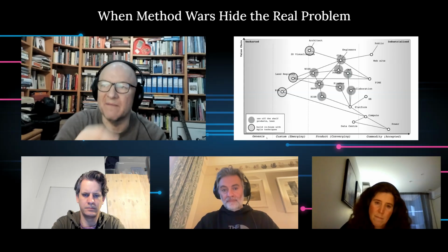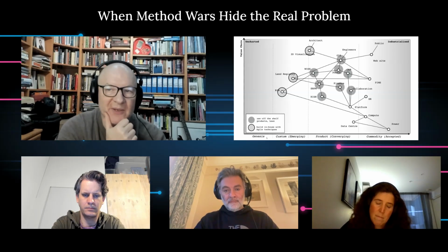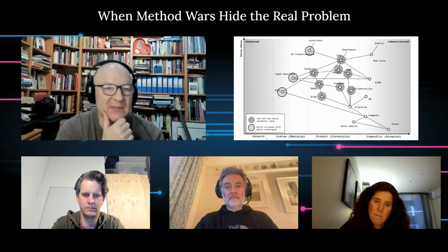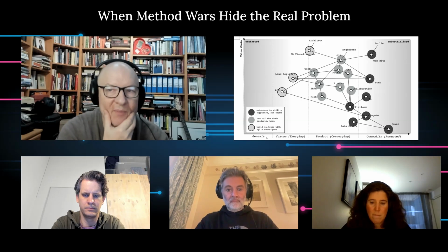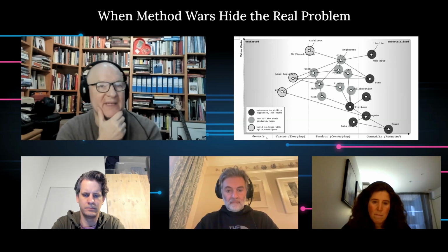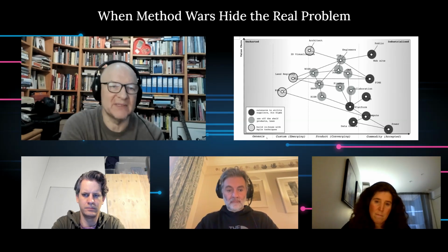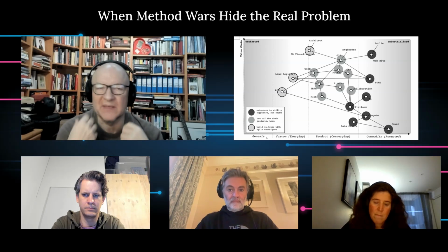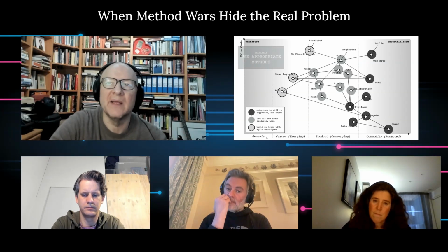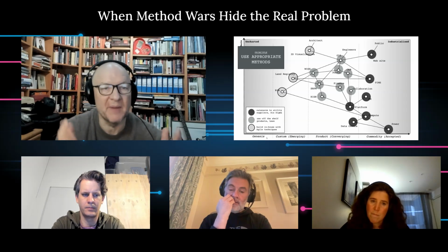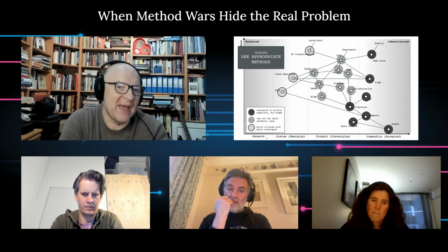More in the middle of the map, you should be using off-the-shelf products, techniques like Lean. Whereas on the right-hand side of the map, you should probably be thinking about outsourcing to utility providers. If they don't exist and you're building, this is where things like Six Sigma come in. So what you learn is you have to use appropriate methods. And that's another pattern that you learn.